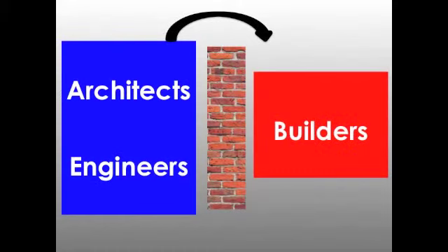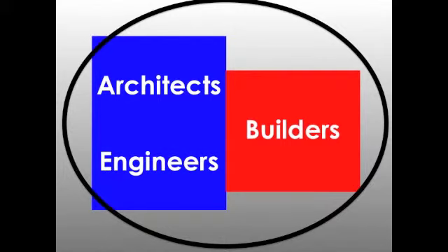In the construction world, we've got the engineers and the architects who work up the specifications, they know their requirements, and then they can throw them over the wall to the builders. But you look at the information work model, and we see that architects and engineers, the people who gather requirements and the software developers, they're doing the planning for the project, figuring out what it is, as well as executing it at the same time.